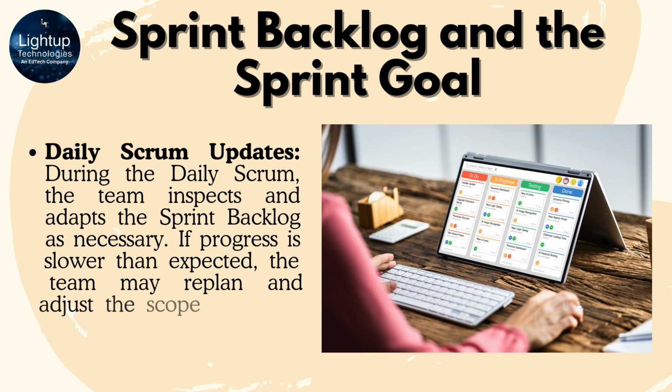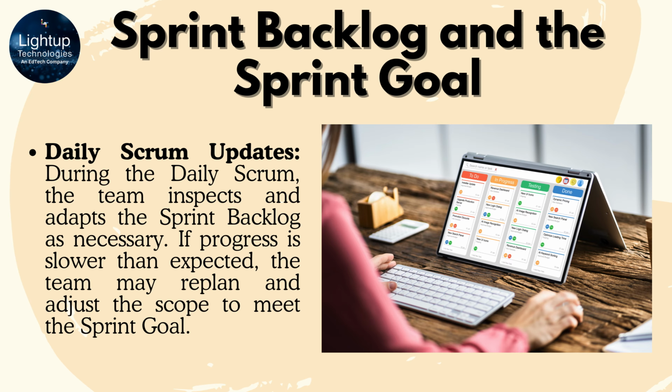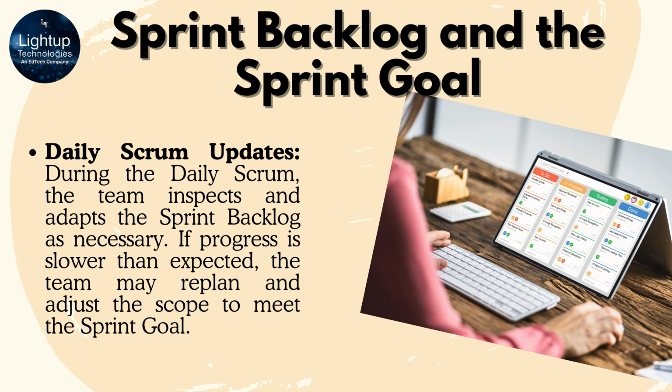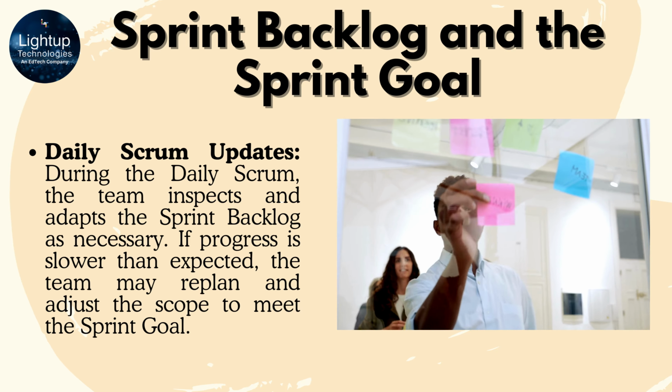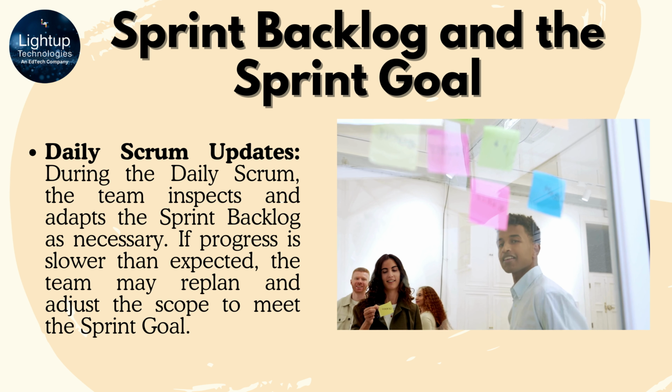Daily Scrum updates. During the daily Scrum, the team inspects and adapts the sprint backlog as necessary. If progress is slower than expected, the team may replan and adjust the scope to meet the sprint goal. Commitment to the sprint goal. The team's commitment to the sprint goal drives the work in the sprint backlog. It helps maintain focus on delivering value and achieving the goal.